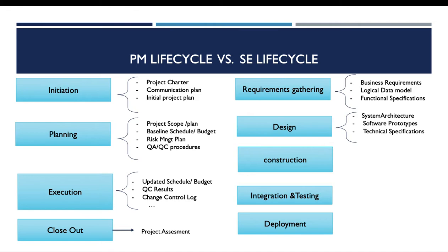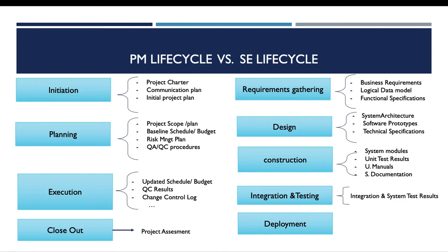At the design phase, we deliver the system architecture, software prototypes, and a technical specification. For the construction phase, we deliver system models, unit test results, user manual, and software documentation. For the integration and testing phase, we deliver integration and system test results.